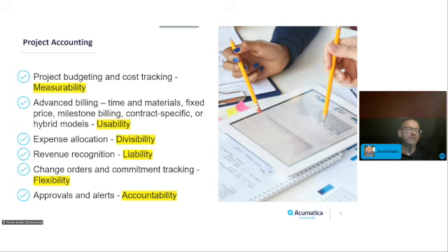And then you've got fixed price billing. You can do milestone billing at completion of phases. As we mentioned with the engineering, if they're completing drawings, then you're going to get a deposit or prepayment once drawings are complete, maybe another prepayment once major materials have been purchased, and then another at shipping, the final payment on the product, but you have the need for installation labor that you're going to charge for.